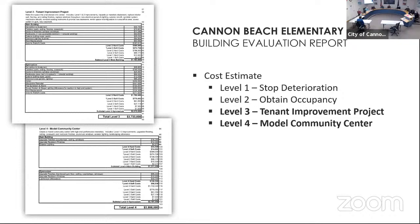So right now you have a quote for $100,000 to replace the roof. But yet if you do a seismic retrofit, there's a possibility that you would have to do that again. There is always the potential to come at the roof from the underside, so you don't have to take the roof off. But normally, most times buildings need new roofs, and so that's where we go at it.